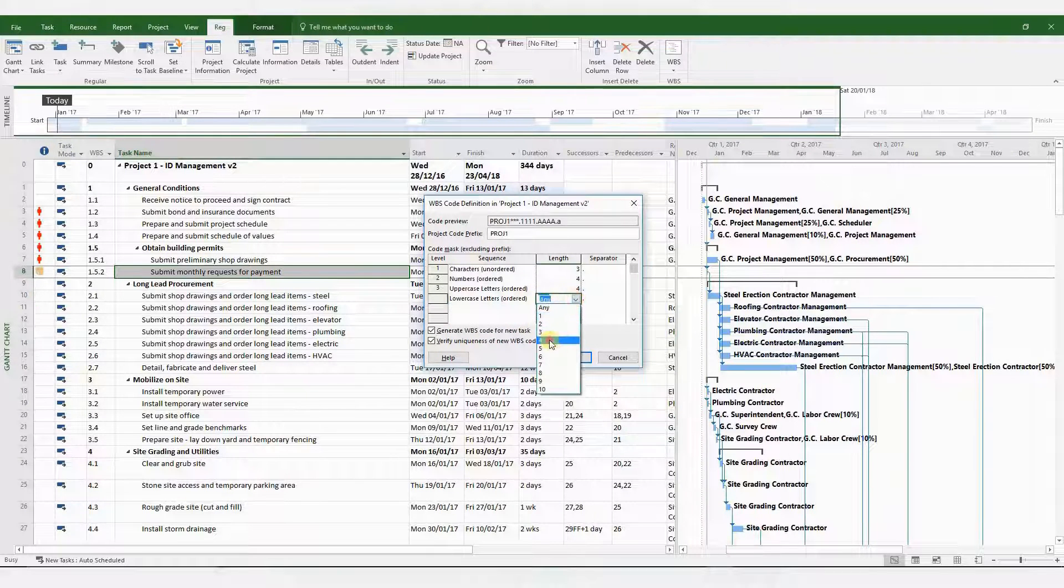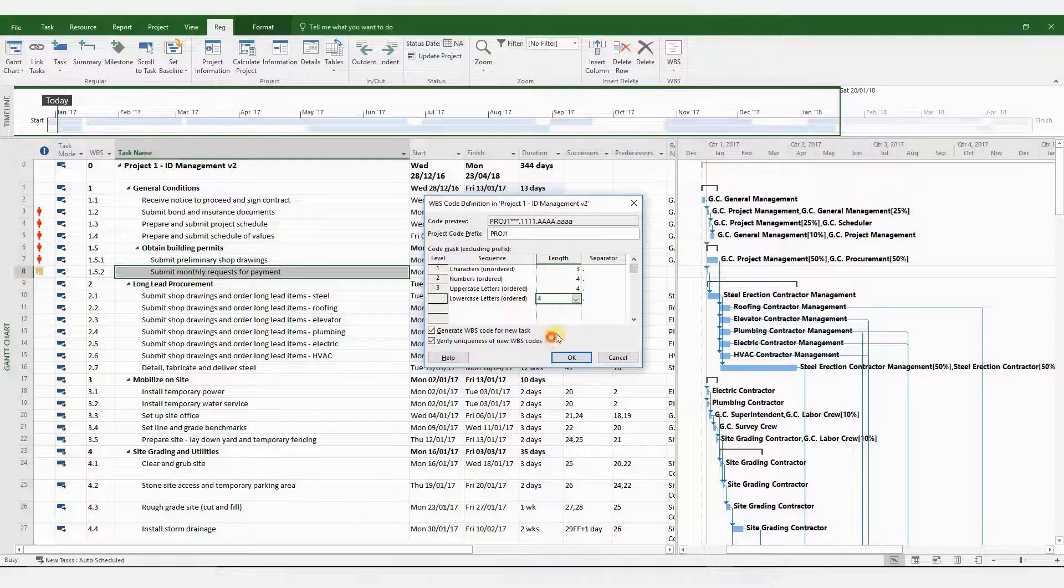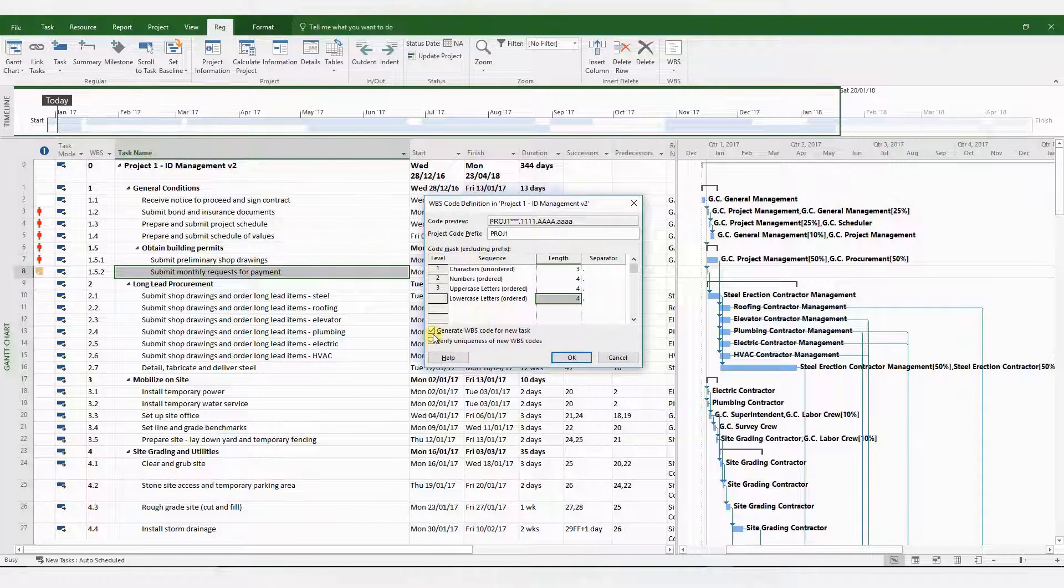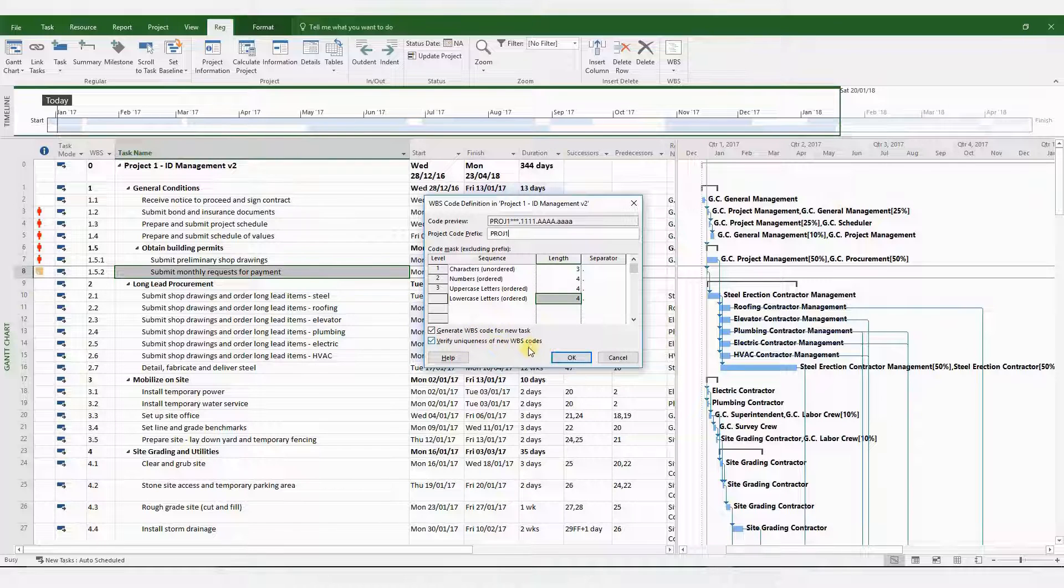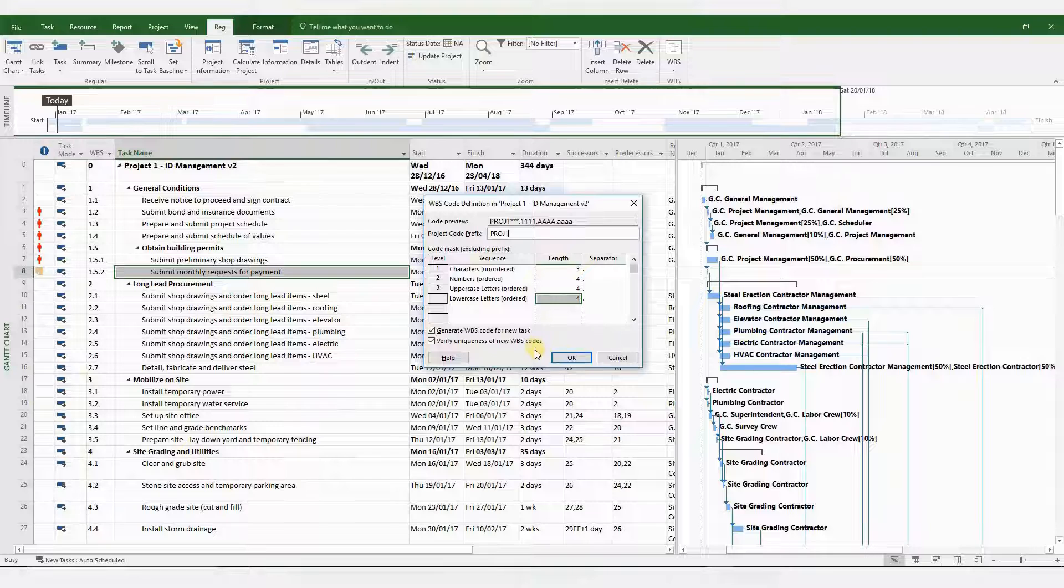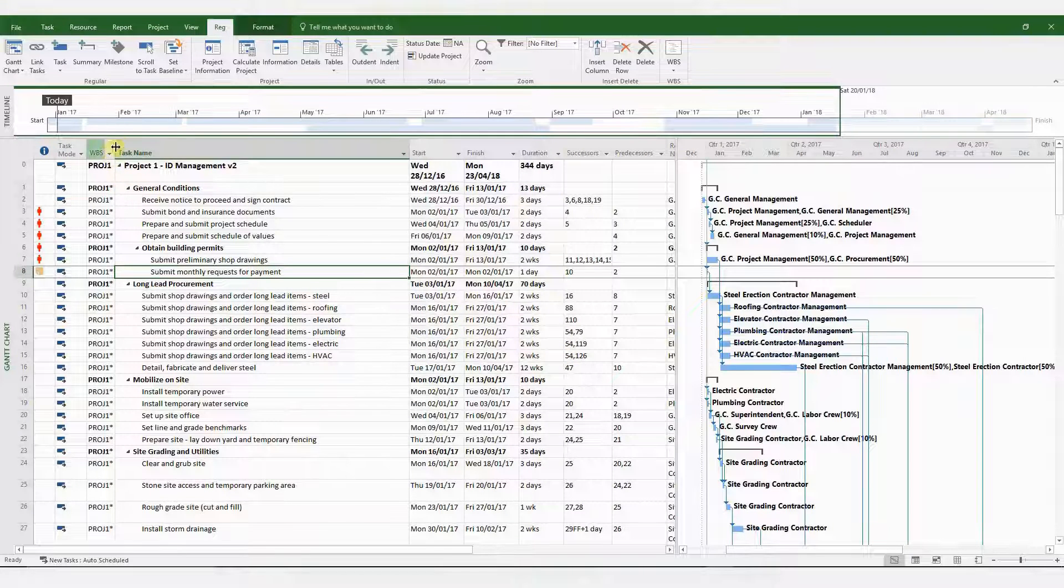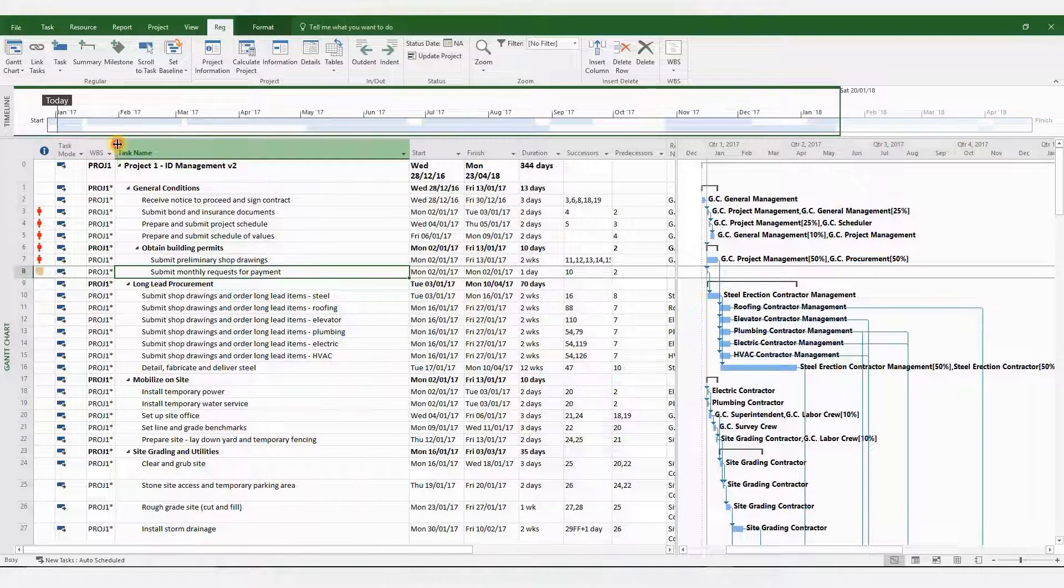And please leave the tick marks on at the bottom of the menu, which is generate WBS code for new tasks and verify uniqueness of new WBS codes. Obviously, this is very important. So once you've done that, the WBS has been recoded.